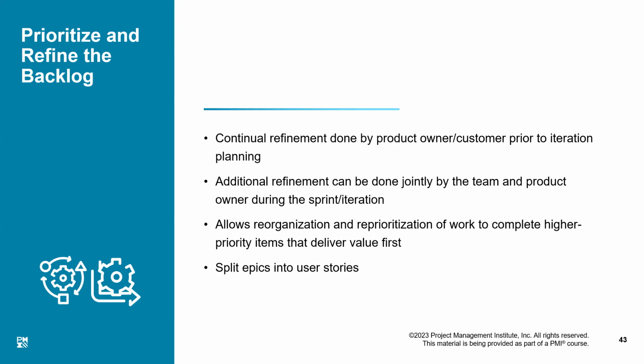And in some schools of thought, we call it backlog grooming. Grooming, just like you groom a bush, you cut extra leaves and extra branches so it can look beautiful. So exactly, the product backlog is treated as a tree, and we are constantly grooming it. After every iteration, we go back and we groom it. Grooming means that all the new requirements we have got, we prioritize them, we put them in the right place, and things like that.